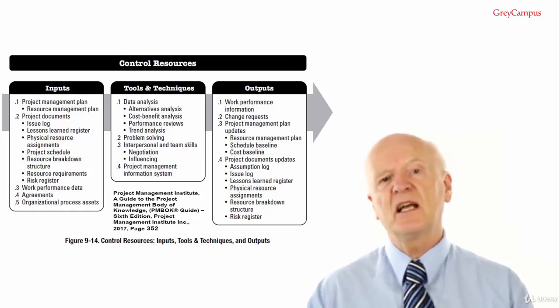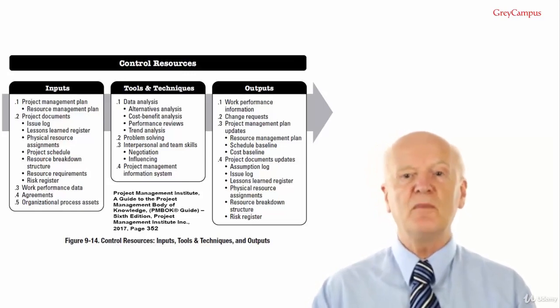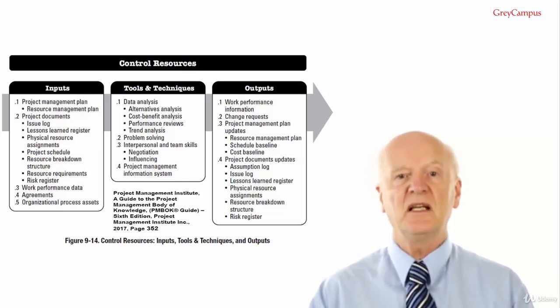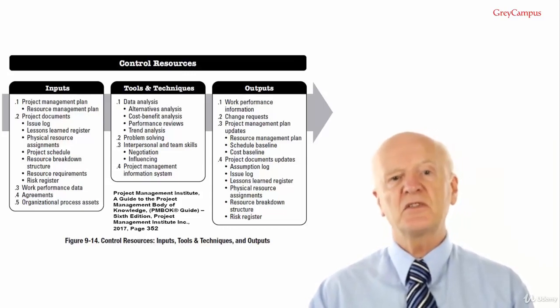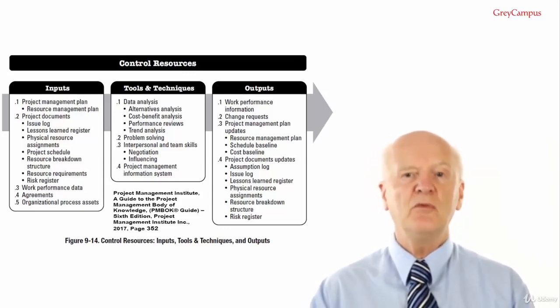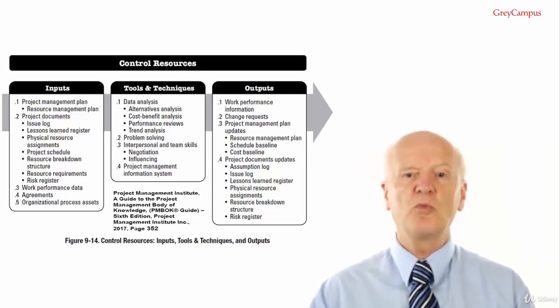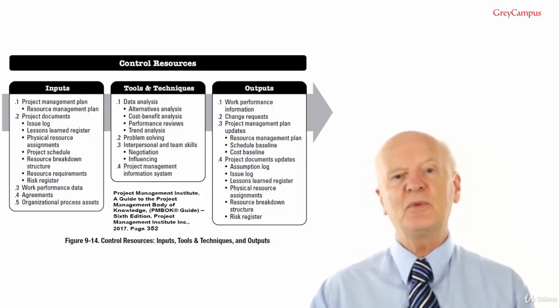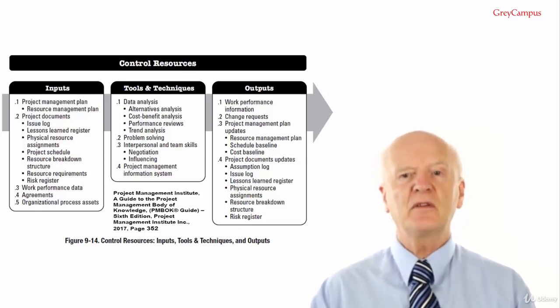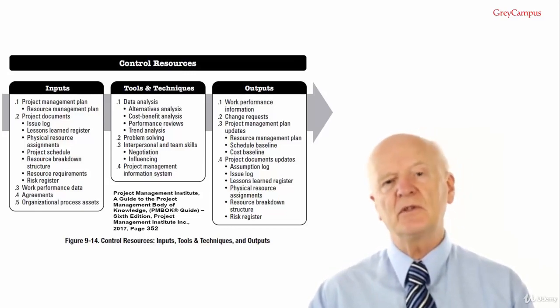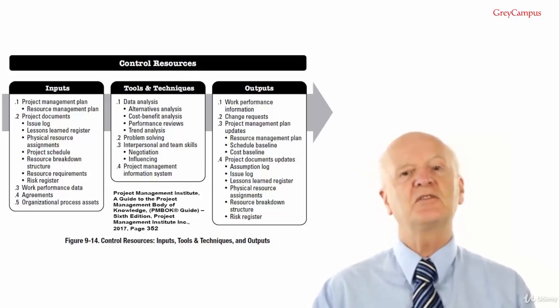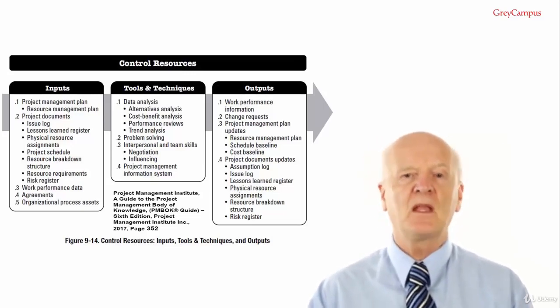The lessons learned register can be updated with techniques that were effective in managing resource logistics, scrap, utilisation variances and corrective actions that were used to respond to resource variances. In the exam, the word scrap means work that was spoiled and can't be economically repaired, rather than leftover materials or offcuts or stuff sitting there that you haven't been able to use.